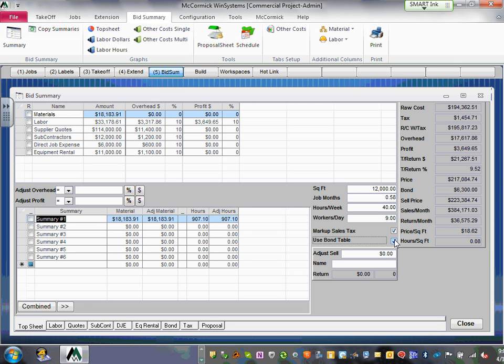Do you see how it added this value, because from the bond, based on the price that we have, it added this amount. Okay, right? The due population. So that has to be added. So I'm sitting now, Karen, at $223,000. The sell price. Can you guys see my sell price right here? This is the most important number. My sell price is sitting at $223,000.